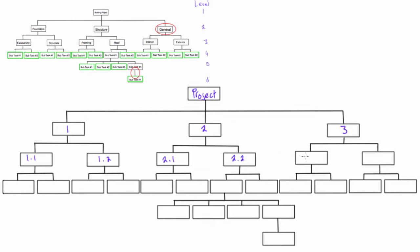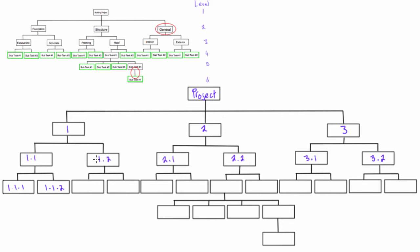When we drop down the next level, we introduce another decimal place and another digit. So this one would be 1.1.1, this would be 1.1.2. When we come down here, this is 1.2, so this leads into 1.2.1, and this would be 1.2.2. So you always carry forward what you had here, and then you just start from left to right, adding that 1 and then the 2, and so on. Here we'll carry down the 2.1.